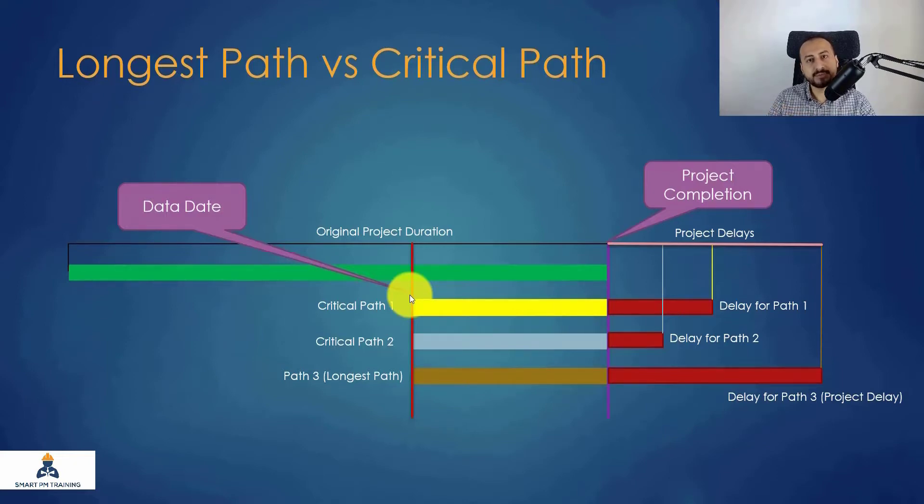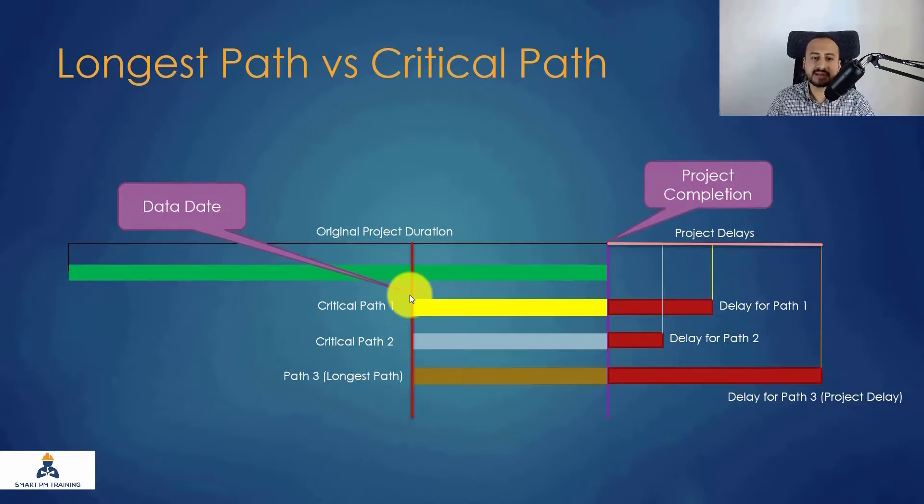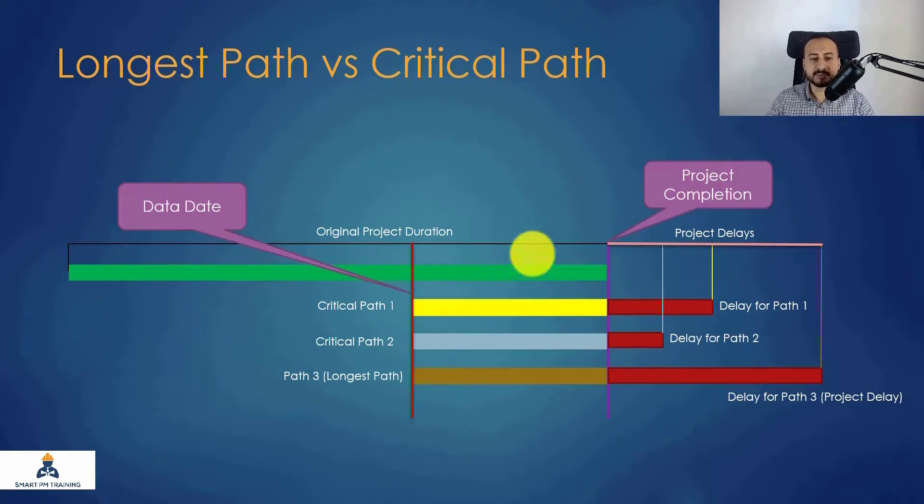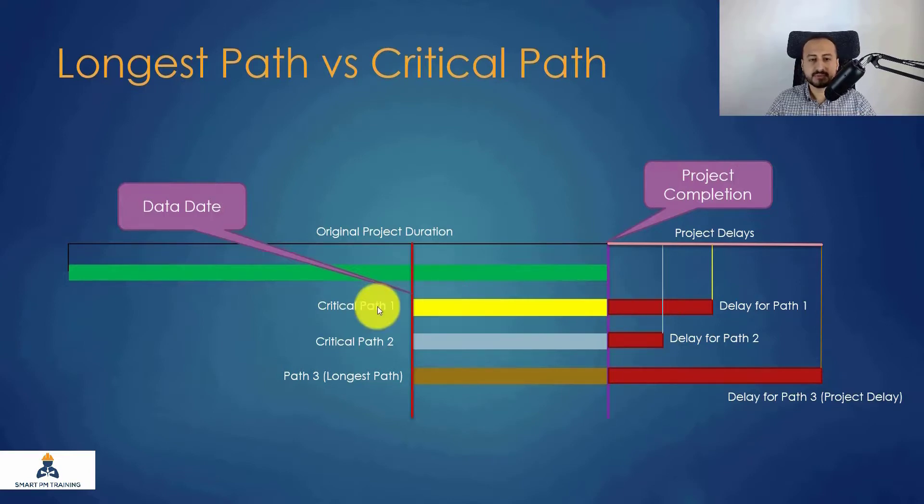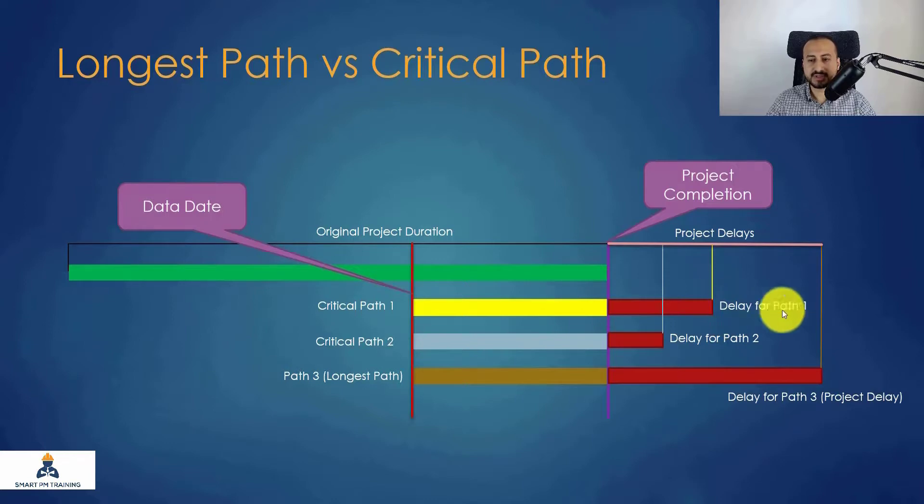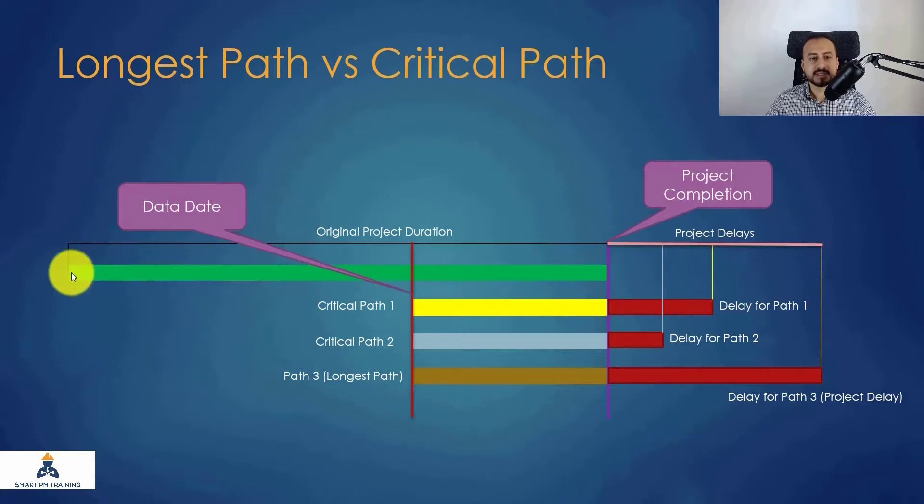When you analyze the critical paths of the project, you can have critical path number one, and maybe you can sort the Primavera with total float path. We have critical path one, it has this amount of delays, so this is overall project delays in the project, and this is the original project duration.